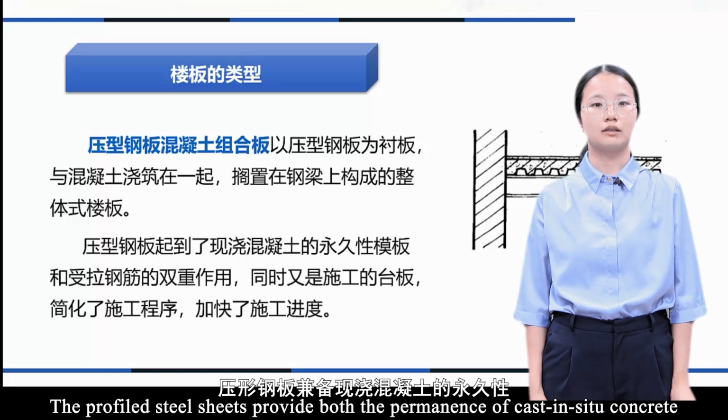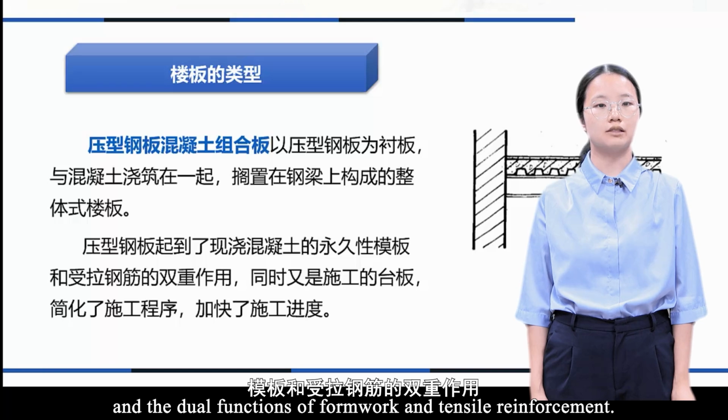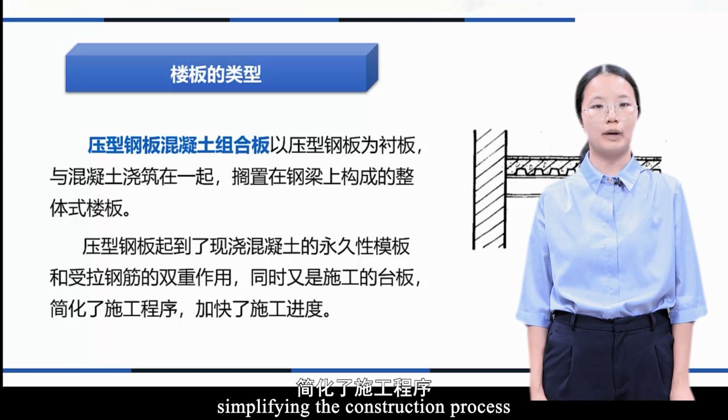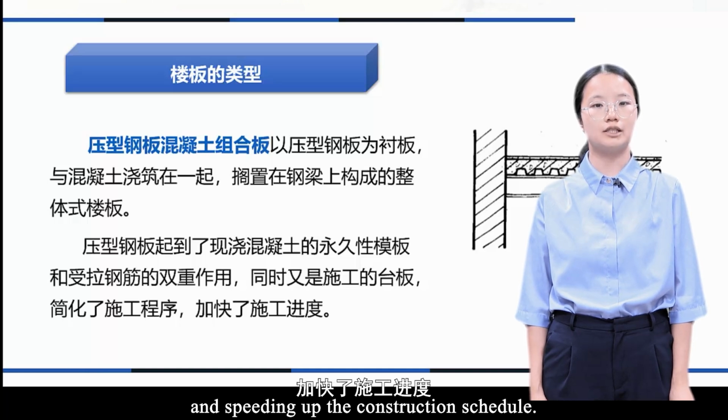Advantages: the profiled steel sheets provide both the permanence of cast in situ concrete and the dual functions of formwork and tensile reinforcement. At the same time, they serve as the working platform during construction, simplifying the construction process and speeding up the construction schedule.